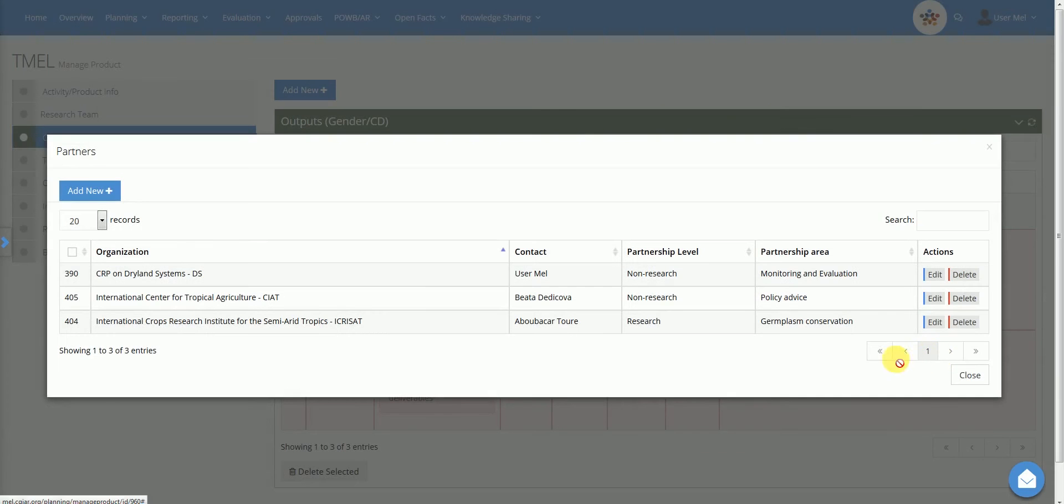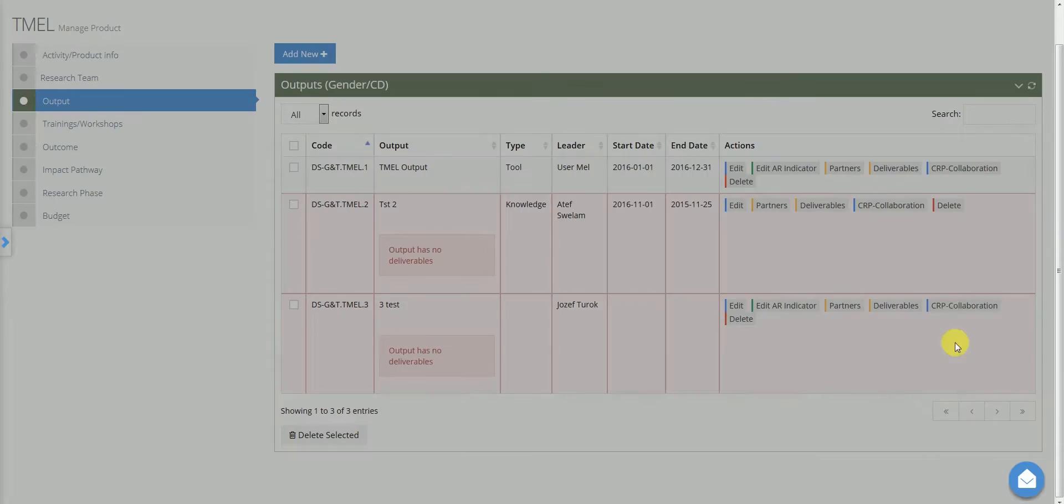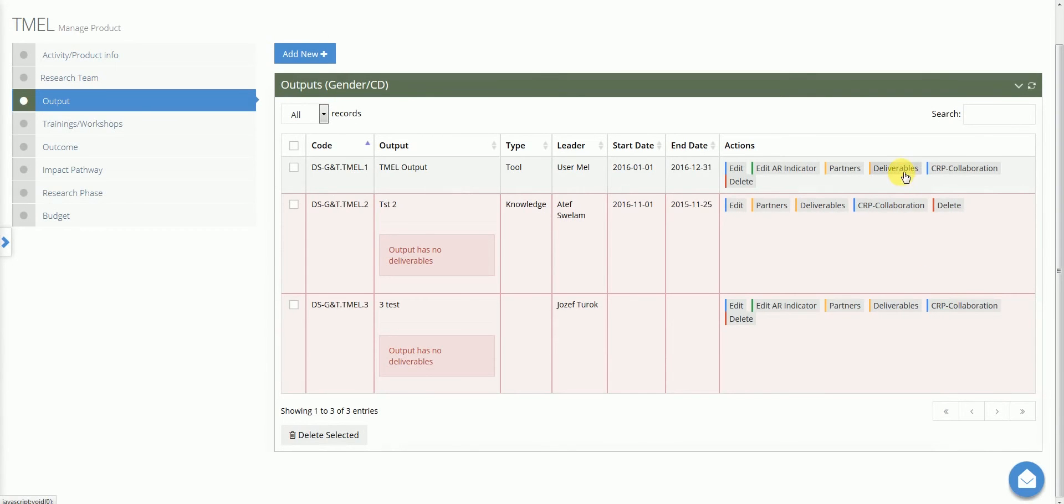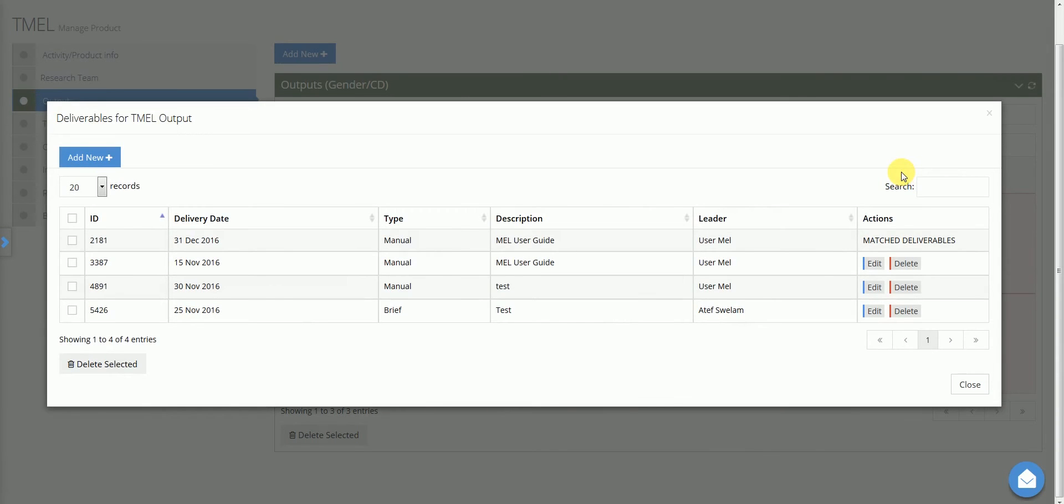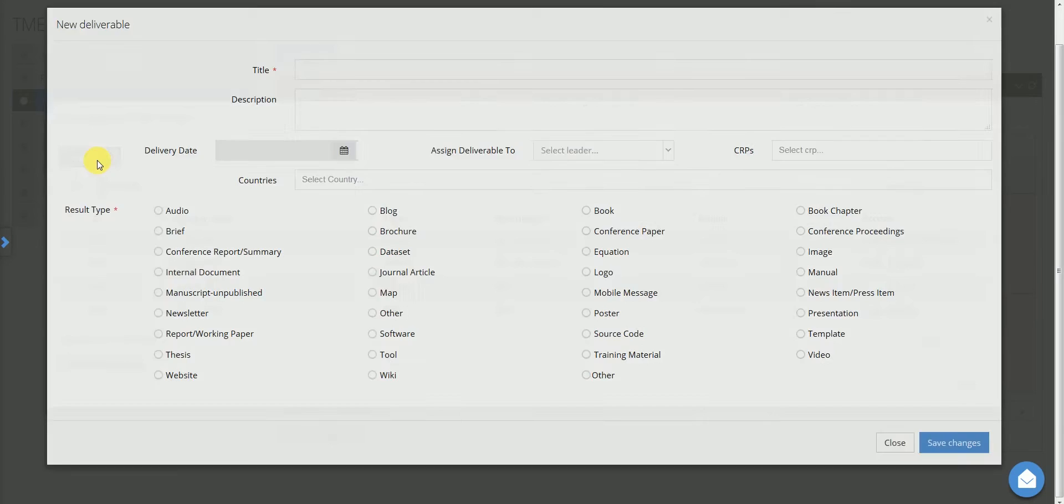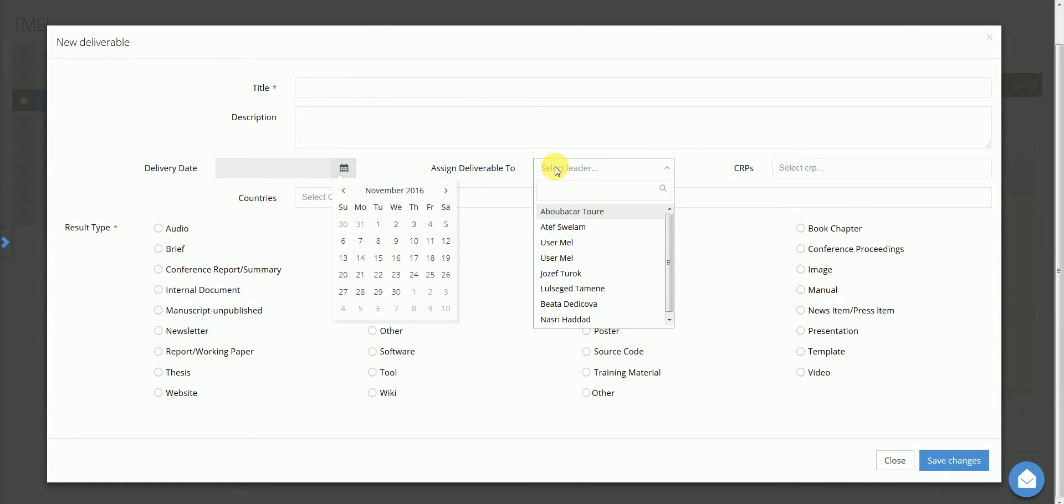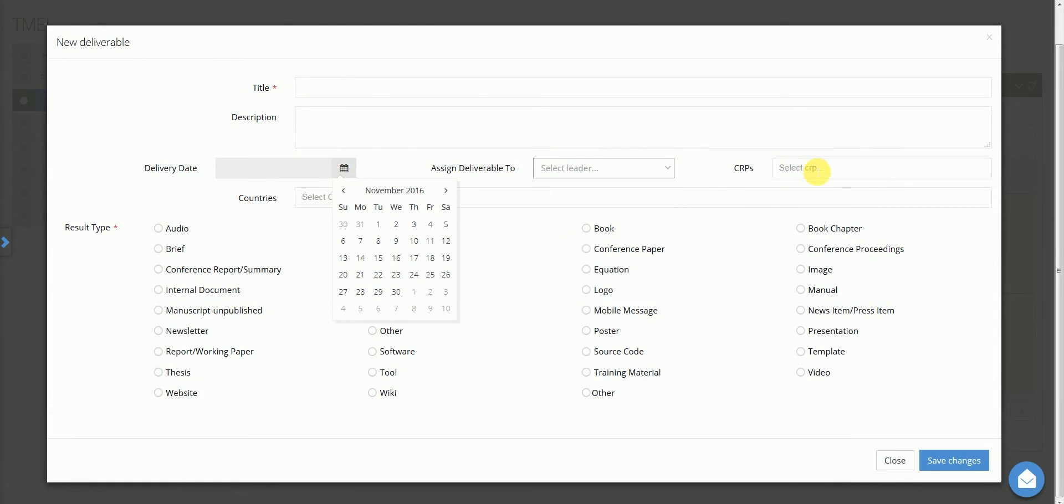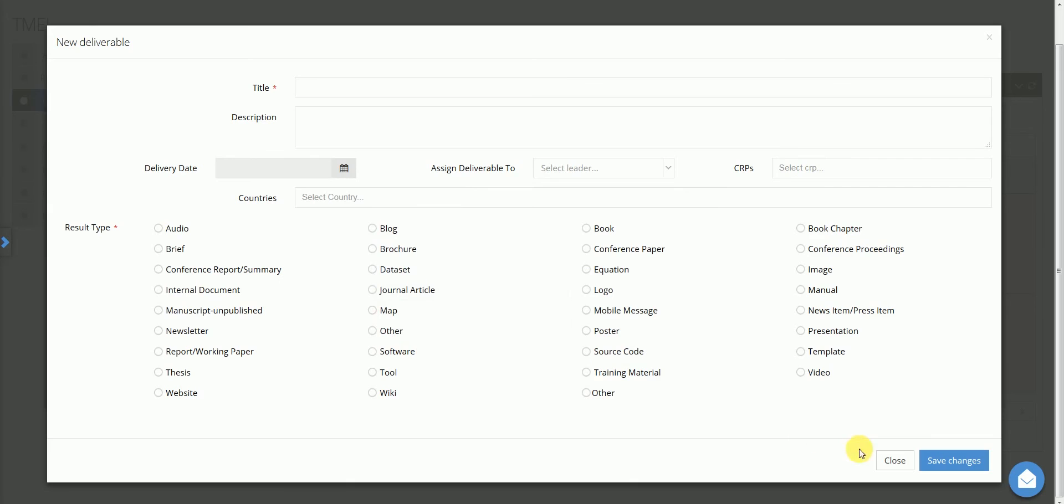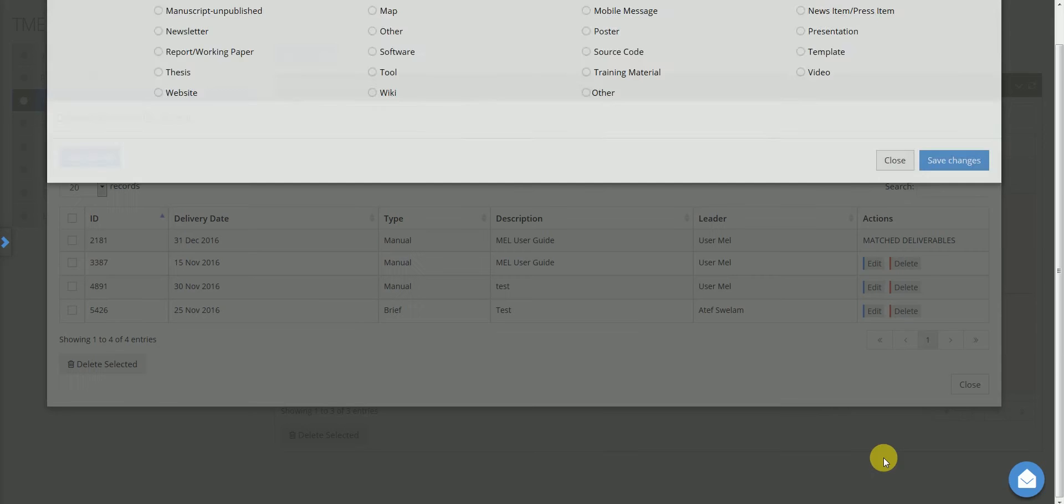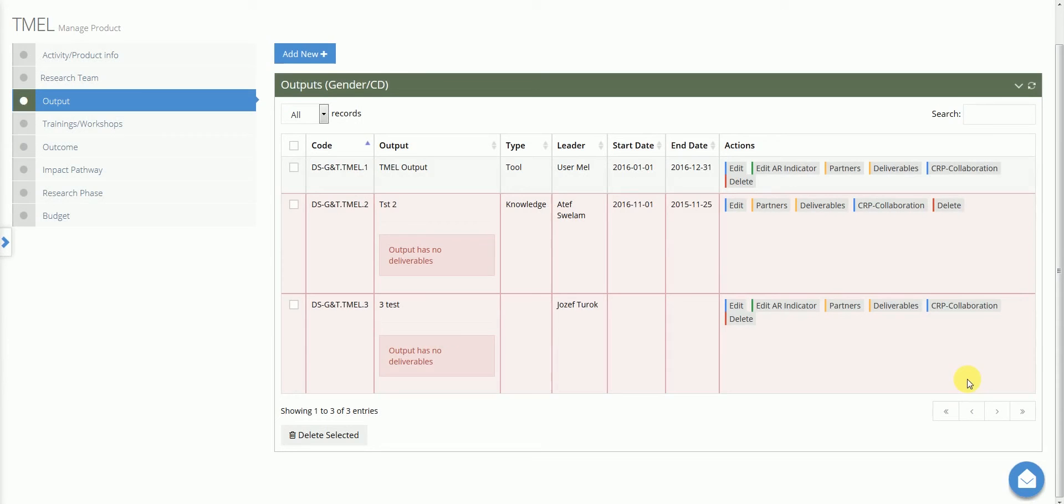With the Deliverable button, the user may register concrete steps that represent progress towards the delivery of the output. To add a new deliverable, select Add New in the top left corner of the page and then provide the title, short description, expected delivery date, leader, CRPs, countries and type. The types used here are in alignment with the ones used in CGSpace.